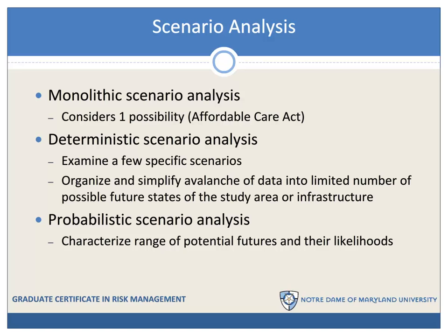Those states might include the best case, worst case, most likely case, for example. And then the third variation is probabilistic scenario analysis. We use this to characterize the range of potential futures and their likelihoods. So this would be the type of thing that we would use Monte Carlo processes for.